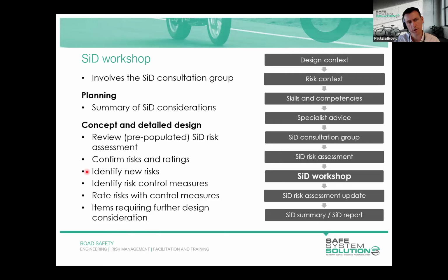Remember, by bringing that larger group together, which includes all our design disciplines involved in the design of the structure, and also workers, you're going to find people with additional knowledge, and new risks will be identified because of those people involved. We're going to identify control measures, and then rate risks with those control measures. From that, we'll have an understanding of any items that require further consideration in our design.